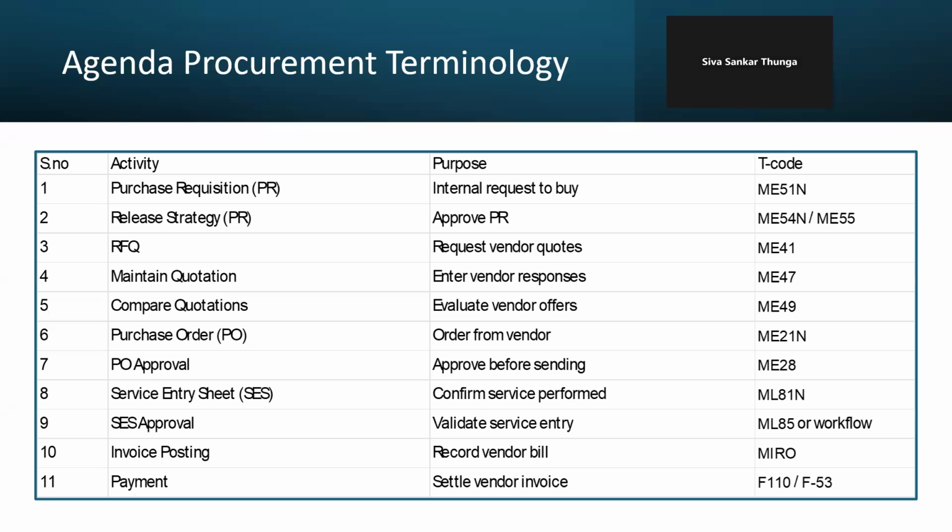the respective department manager. He will have the authorization, because each division has one purchasing group through which the authorization control is applied. Whenever the civil department creates a purchase requisition, it will go to the civil head. When the electrical department creates one, it will go to the electrical head. It is based on the purchasing group, for which a code will be there. Whenever we create a purchase requisition, we maintain that purchasing group within the PR at the line item level. Based on that, the system will trigger to whom it has to go for approval.